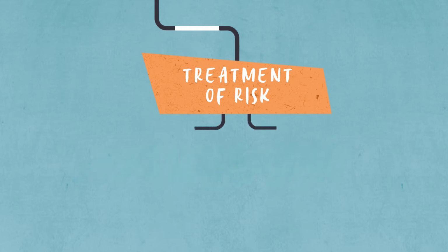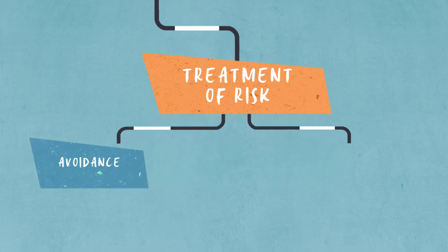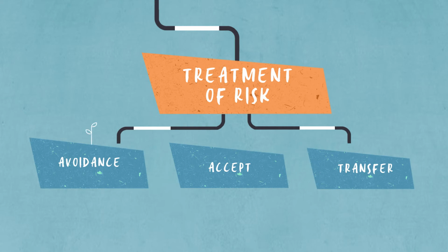You now have 3 choices. You can either avoid your risk, you can accept the risk, or try and transfer it to others. When avoiding risk, you could do this through redesign, by trying to reduce the impact or the probability. Look at what you control.